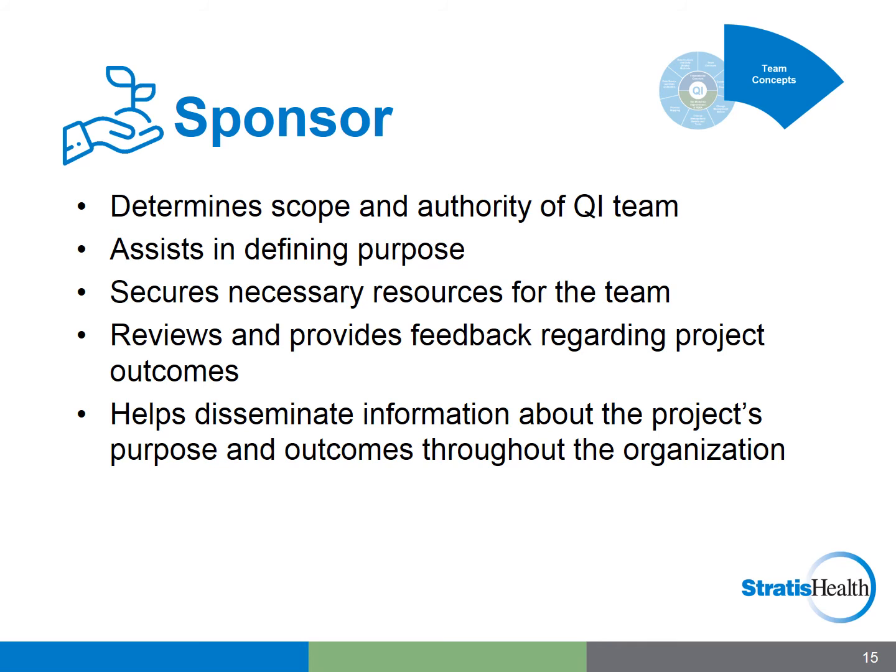The project sponsor is frequently an executive or leadership person who empowers the QI team to undertake its work. They will determine the scope and authority of the QI team, assist in defining its purpose, secure necessary resources for the team, such as allocating time in team members' work schedules, review and provide feedback regarding project outcomes, and help disseminate information about the project's purpose and outcomes throughout the organization. The sponsor may participate in team meetings at the outset and conclusion of the project and may attend meetings on an as-needed basis depending upon scope and duration. The team typically communicates with and confers with the sponsor throughout the project.